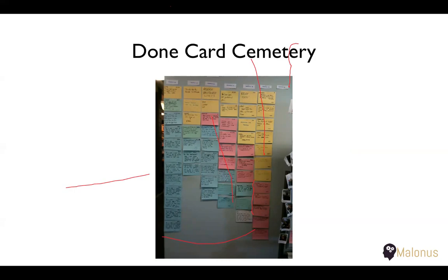So it gives you a kind of trend. You see the defects are increasing from iteration to iteration. In the final sprint, the defects are more. So with this trend, you can see whether you want to take some action or not. The point is that done card symmetry gives you some data points in case you want to do a postmortem of what really happened in the past.